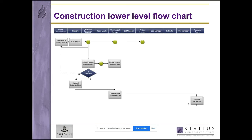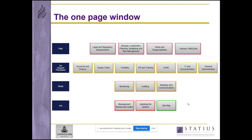This shows the first part of the process of reviewing an order or letter of intent. The roles for various organizations and individuals are shown along the top in blue. Grey boxes show the activities undertaken and the blue diamonds show a decision — in this case whether or not to accept the order — and green dots show where others are informed. Clicking on the relevant box took you to further narrative with additional information and click-through to policies, forms, templates and other parts of the system.